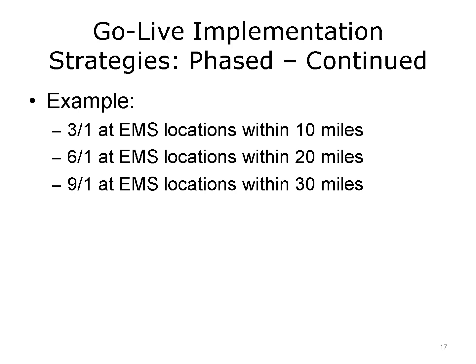However, on the positive side, the phased approach can lead to earlier adoption of new technology and capabilities. Suppose the EMS locations within 10 miles of the hospital are targeted as the first phase, and this group represents the majority of the ambulance service to the emergency department. This approach could be a significant win for all concerned, patients, clinicians, EMS professionals, and IT, because the first phase would be more manageable than a Big Bang for IT, yet most of the IT customers would be served in the earliest phase of the GoLive.